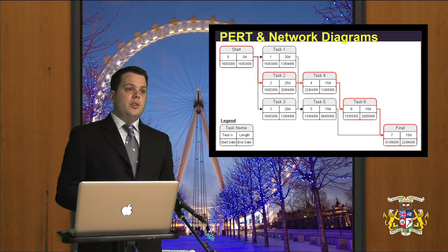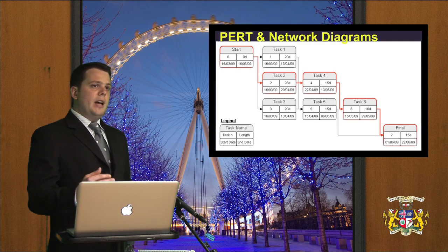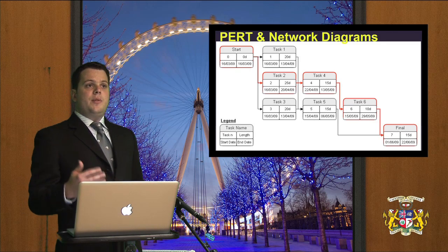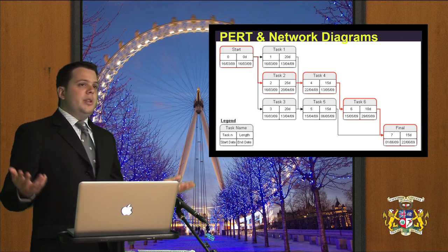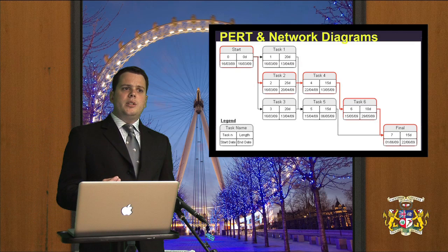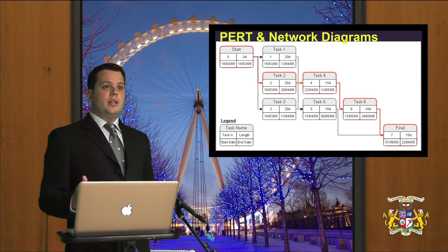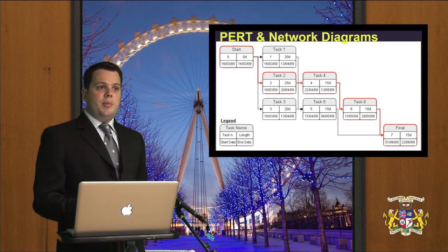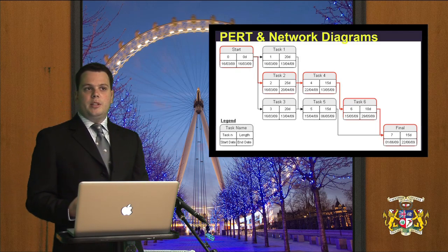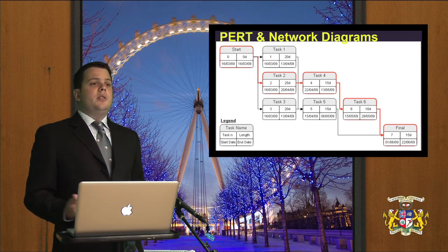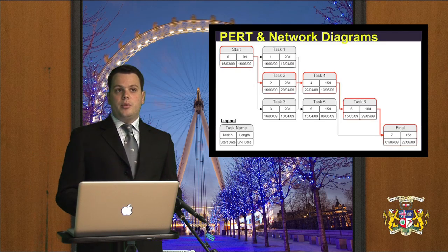The stage gate model, on the other hand, which is used for new product development, gives you the opportunity and the flexibility to cancel the project at any point in time if you realize that your project might not have the expected outcomes. This can happen in technology companies, for example. Let's say that they're developing new software, and halfway through the software development process they realize that there is a new technology in place, or that the project they're working on has now become obsolete because of new advances in the market. Therefore, it makes no sense to continue with the project, and when it reaches a certain gate, the decision to kill the project can be taken.